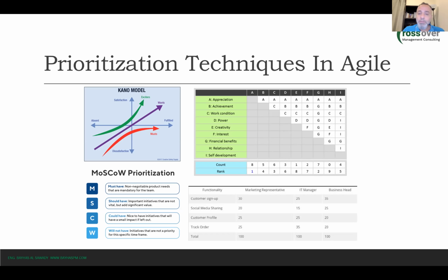The next step was that we took this scope that is now defined as a whole scope, and we broke it down into more manageable and smaller pieces in a hierarchical fashion that we call the WBS, the work breakdown structure, right? And the work breakdown structure helps us basically make sure that we will not forget any part of the scope of the work that we need to do.